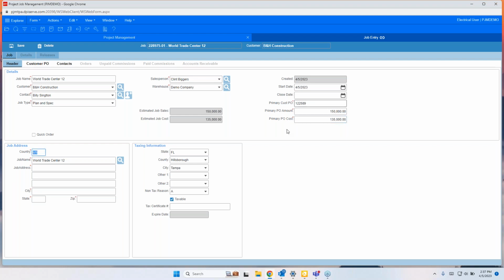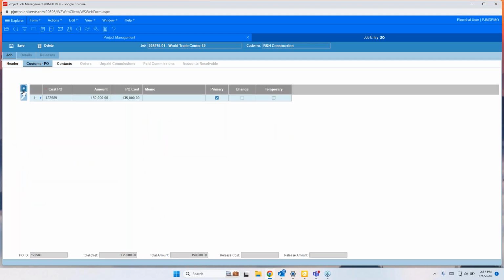Now, at the end of the day, what's going to happen is I'm going to balance out what my purchase orders that I got from my customer was to what actually I billed my customer, or the same thing with cost. If I'm expecting it to be $135,000 and at the end of the day, it turned out to be $180,000, what happened? What did I lose? Where did I lose it? Right, so this is where I do the original purchase order or the primary. Over here, I can do additional purchase orders as they give them to me.